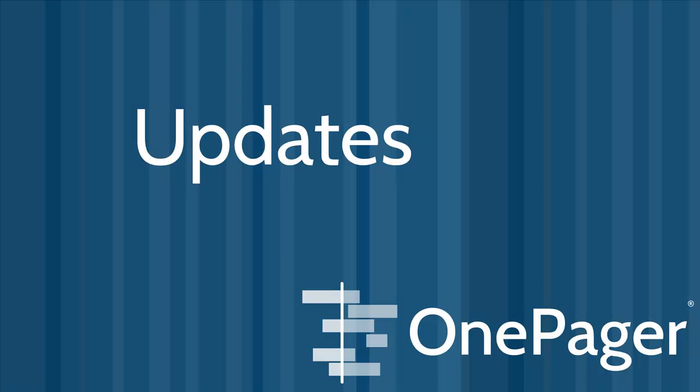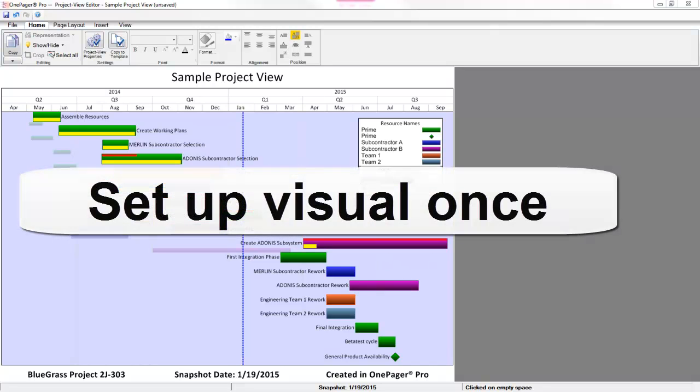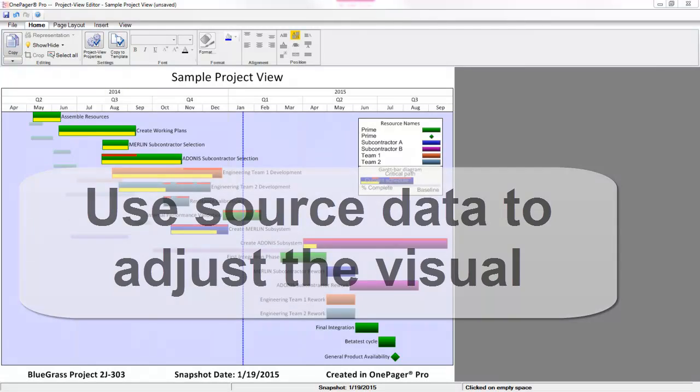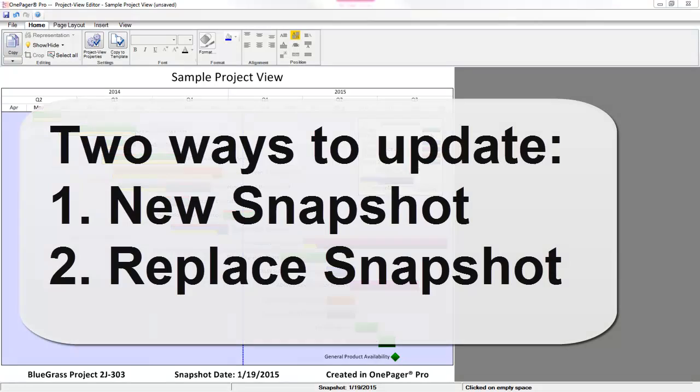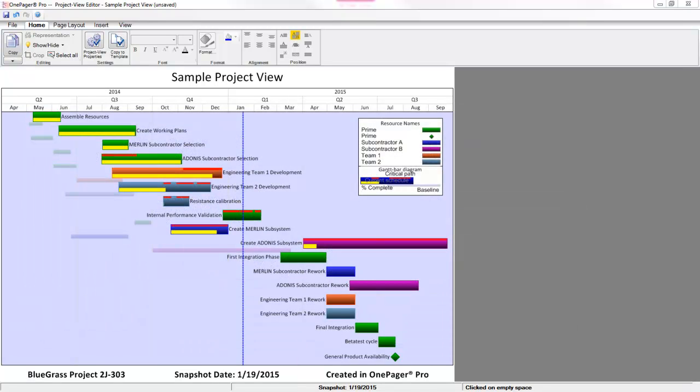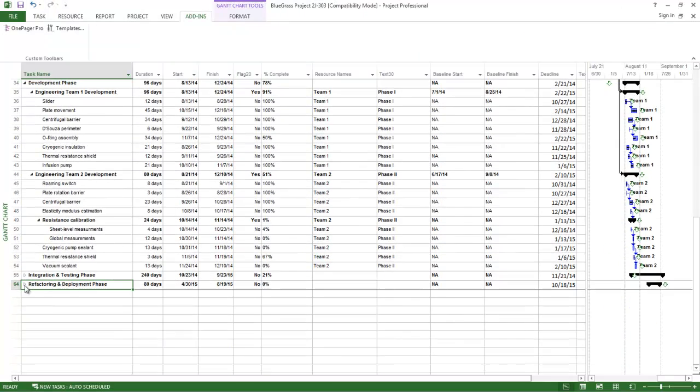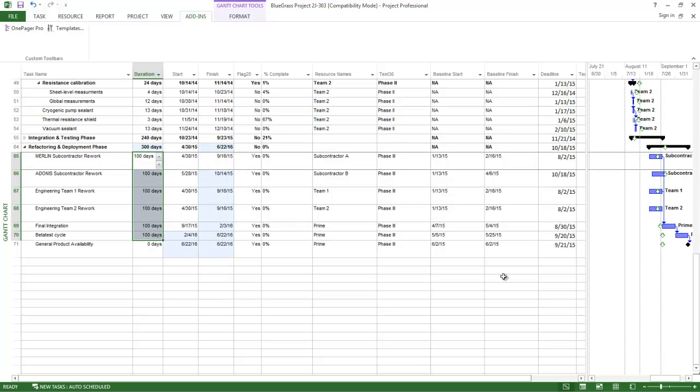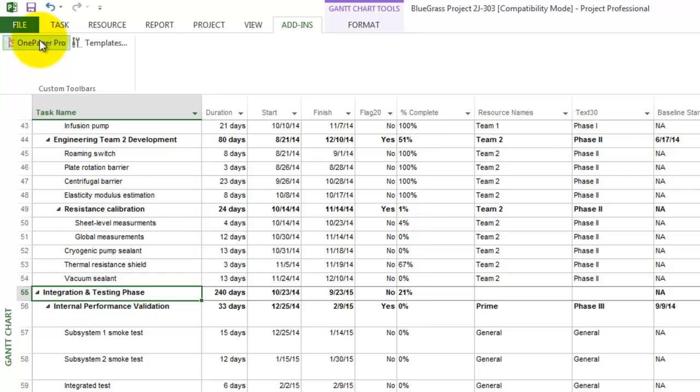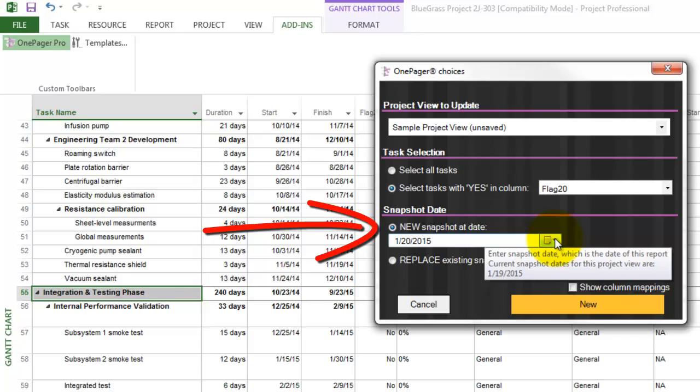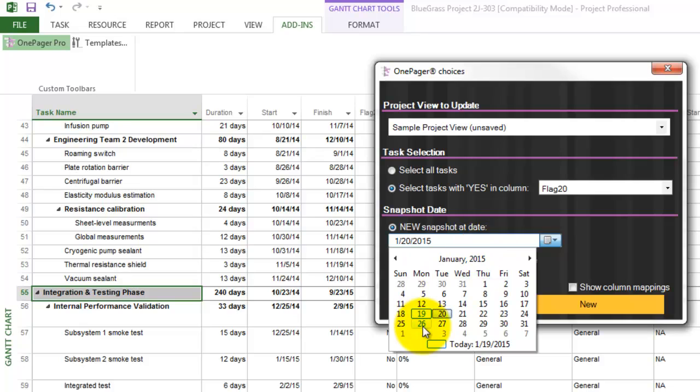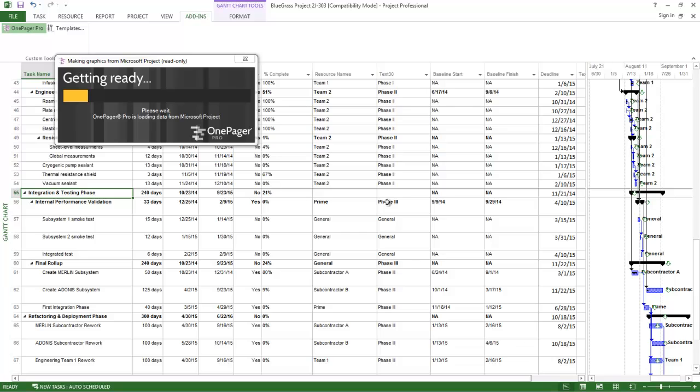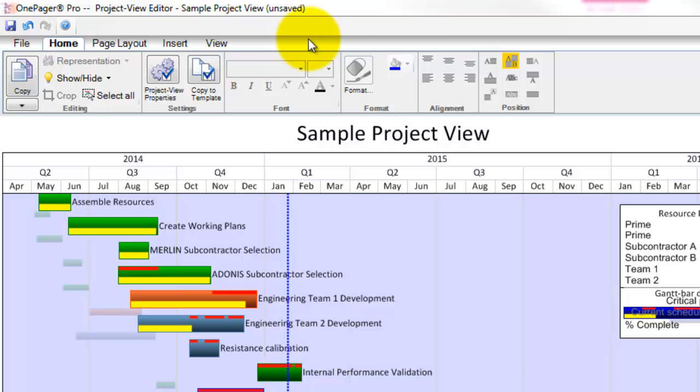Updates. One of the best things about OnePager is that it allows you to set up a visual for a recurring meeting, and then simply use the source file to adjust the chart whenever your next iteration of that meeting occurs. There are two standard ways to update your visuals in OnePager, and they are by adding a snapshot to a project view, or by replacing an existing snapshot. First, let's pretend that we've just presented this visual in front of us to an audience that we know we'll have to present to each week for the next several weeks. Now a week is going to go by, and some change is going to be inflicted upon my source file. Now it's a week later, and I need to walk into my weekly meeting with an updated visual. First, I'm going to click my OnePager button. Then I'm going to click Update. Here I can select to make a new snapshot, or replace the snapshot I have. I'm going to create a new snapshot. Then select the date of my meeting, which is a week later, and click New. OnePager is going to pull in a fresh set of data from my source file, and present me a new snapshot.